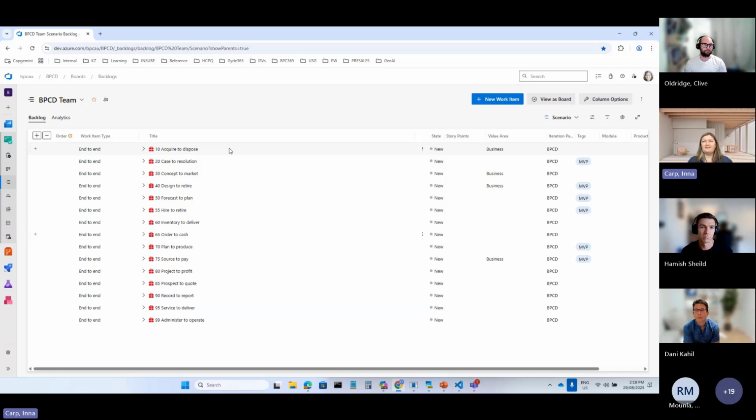So the flow would be that we save the recording from our workshop, and the workshop is based on one of these end-to-end processes, for example, order to cash. The GitHub Copilot will pull that information from the transcript, and we can ask it to map what we discussed in the workshop to the existing requirements in the library and populate those descriptions based on the instructions that we provided. And after it was done, we have the description, we have the acceptance criteria, it can be assigned to the consultant, and the status can be changed to active.